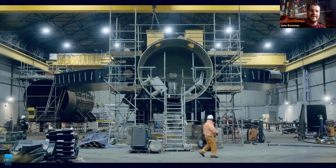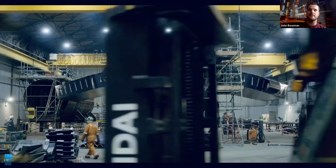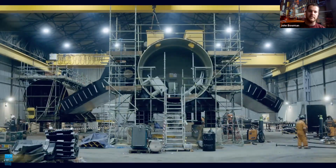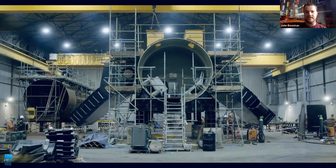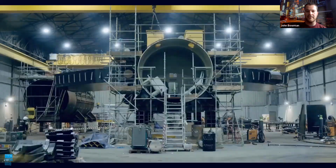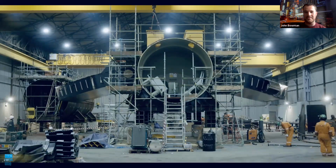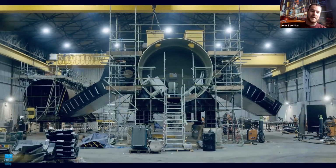So during the build, this was one of the key moments. This was the first time we actuated the legs. It's important as we're going through the entire build, as most of you will be aware, to test at the smallest component level you can. And for us, this happened to be the smallest component level that we could do this test at.